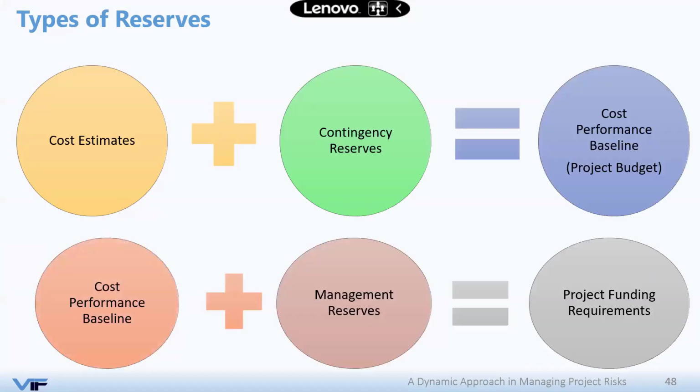So remember that when you are developing the strategies, you need to factor that into your project budget. Contingency reserve is what we call a reserve that deals with the known unknowns. All the risks that you identified on your risk register, you need to have some amount of money that you put on top of the project budget to deal with them, and this will be factored within your project budget. However, on the other hand, we have management reserve, which is to deal with unknowns. Basically, any unforeseen events that we did not expect to encounter on our projects, and to deal with them, we put aside some management reserve. Project managers usually are not empowered or authorized to spend from the management reserve, but they can spend from the contingency reserve. And many organizations keep one management reserve for all their projects under the organization.